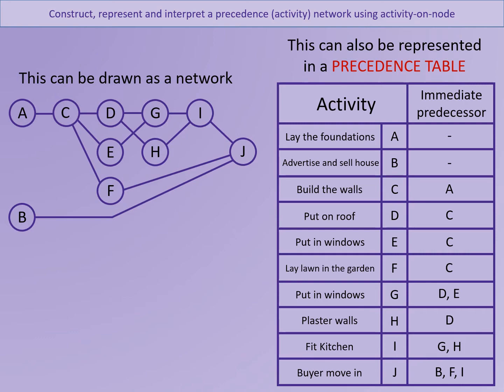Sometimes you will see that there will be an additional activity called the end, where everything leads into to show that the project has been finished. This isn't necessary, so as we can see here, J also doubles up as being the end activity.